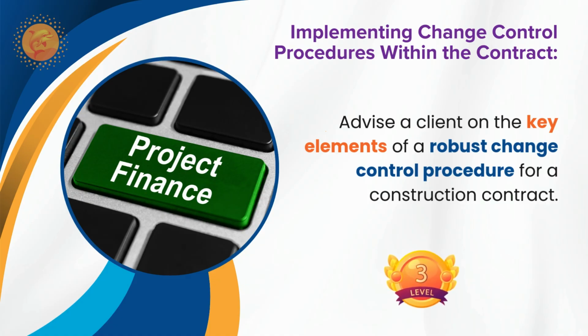For this robust change control procedure in different stages, as per my knowledge, first is the importance of the change, then whether it is required or not required, then if the budget is there, budget allocation approval from the finance department.